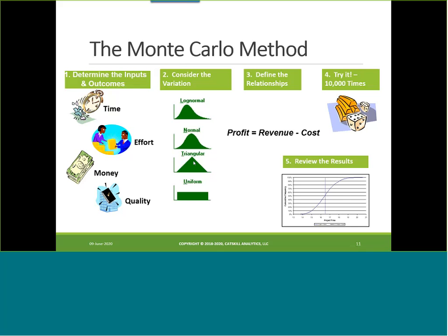It really is. It's sometimes very surprising the shapes of some of these curves. One of the things we didn't really talk about tonight, but the overall general shape gives you a very good insight into the risk that's involved. And when I say risk, I mean the uncertainty. If this little picture we're seeing down the bottom right-hand corner here that we've looked at a couple of times now, if that's real steep, in other words, that S curve is fairly flat on the ends and fairly steep in the middle, it says that that's fairly low risk. In other words, all the outcomes are fairly close to each other. If that's really flat and elongated, it says there's quite a bit of risk and the outcomes are basically all over the place, right? These don't always come out nice, smooth S-shaped curves. It's partly because of the fact that all the distributions were triangular here.